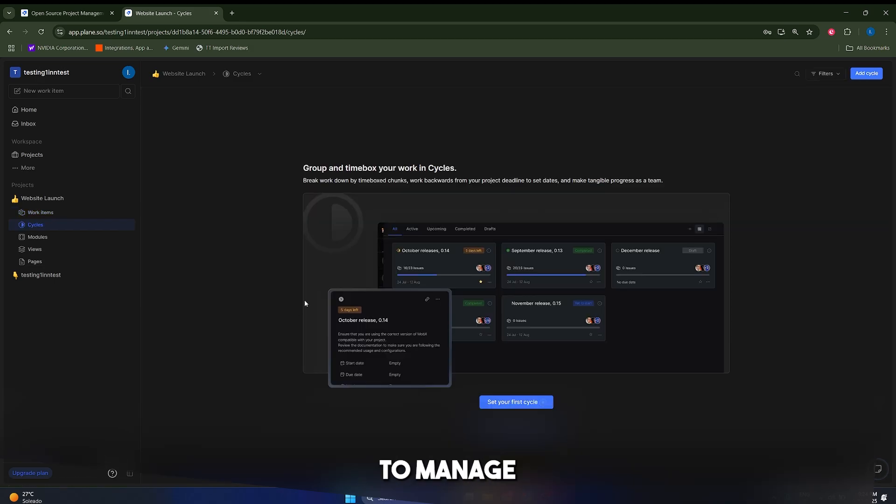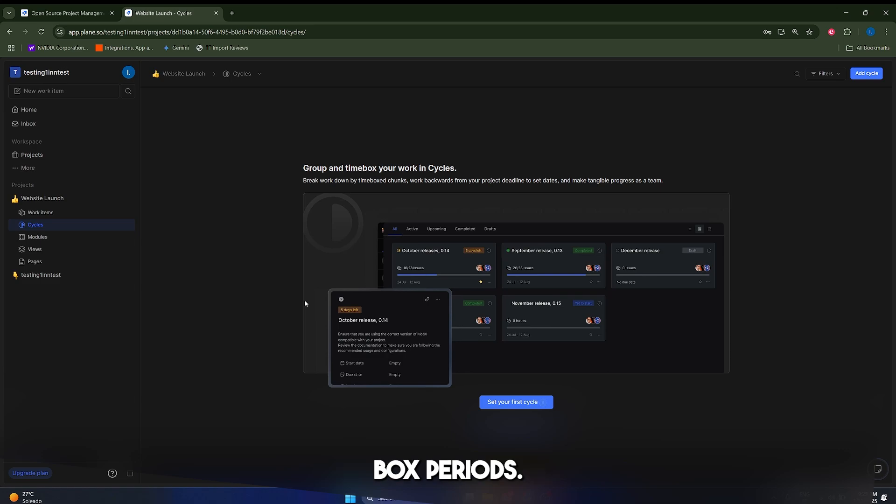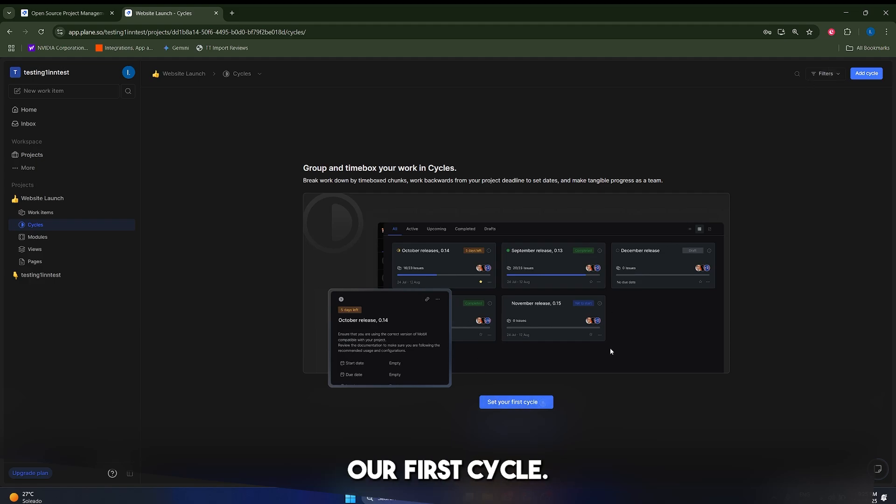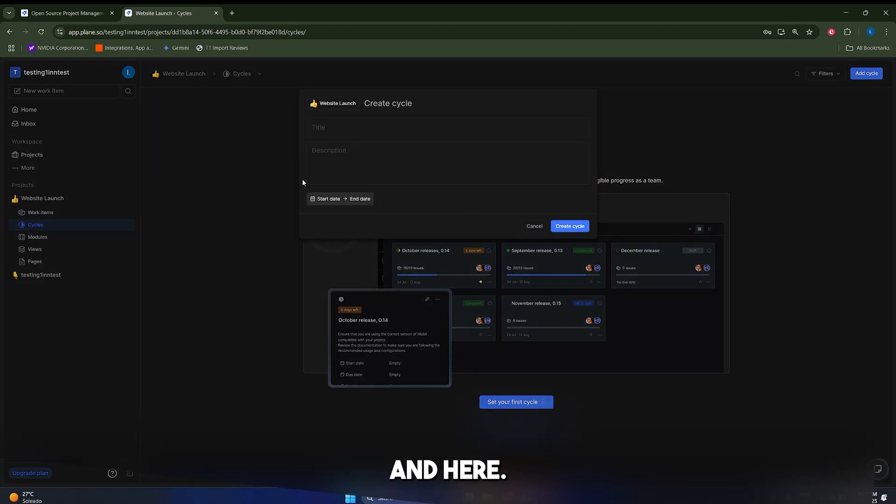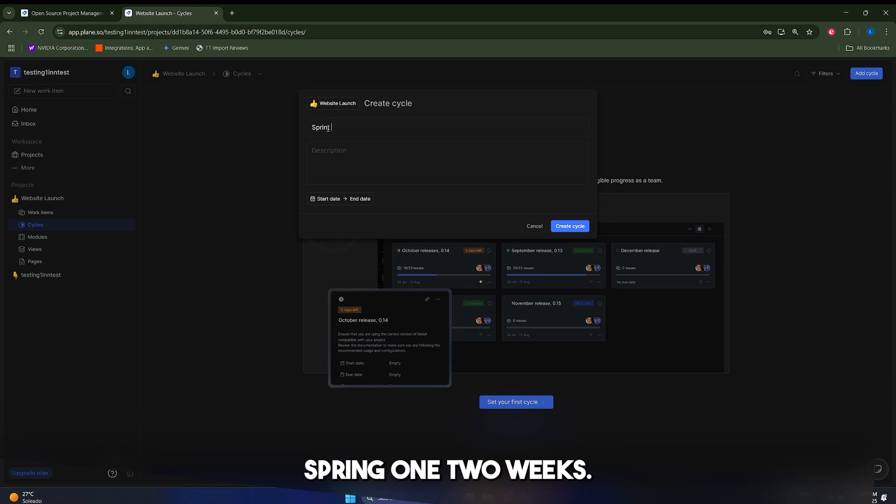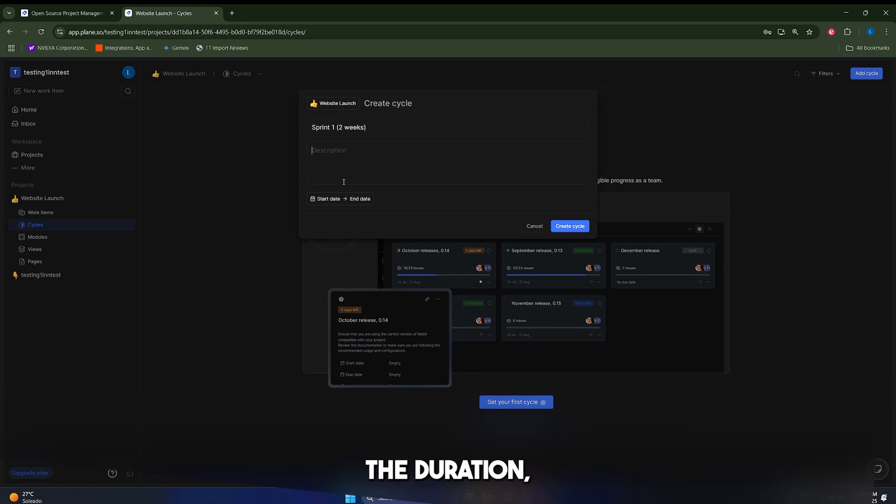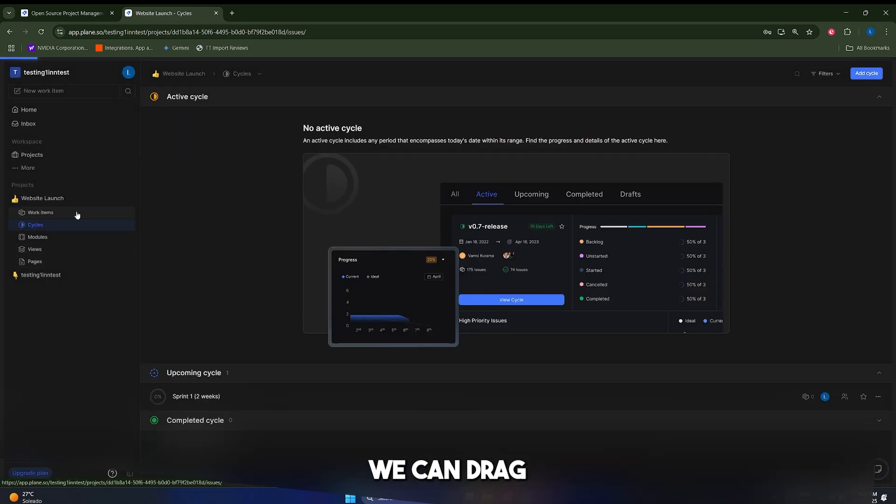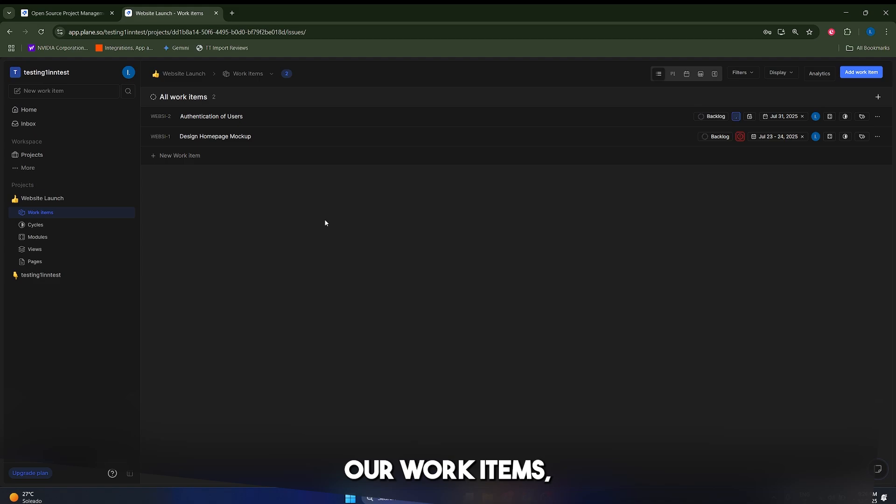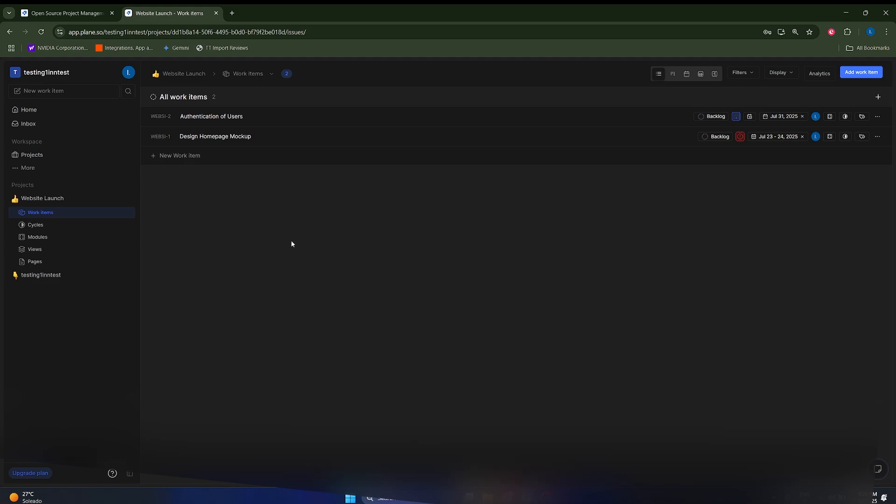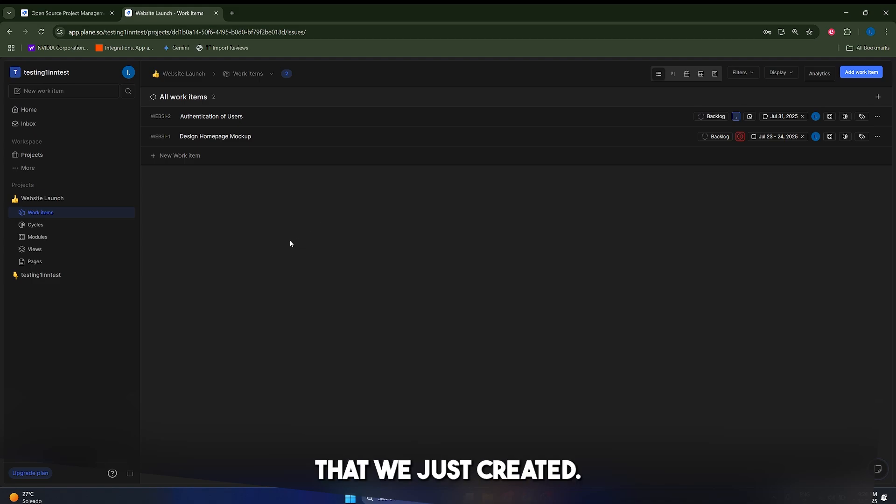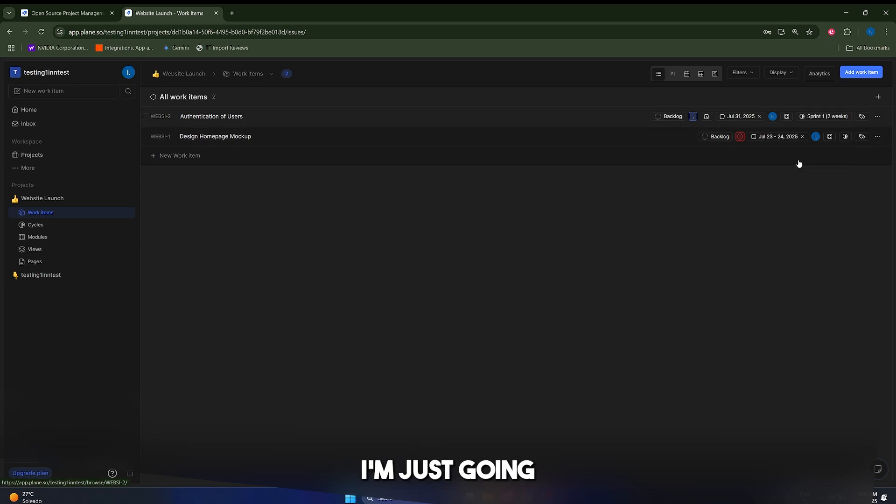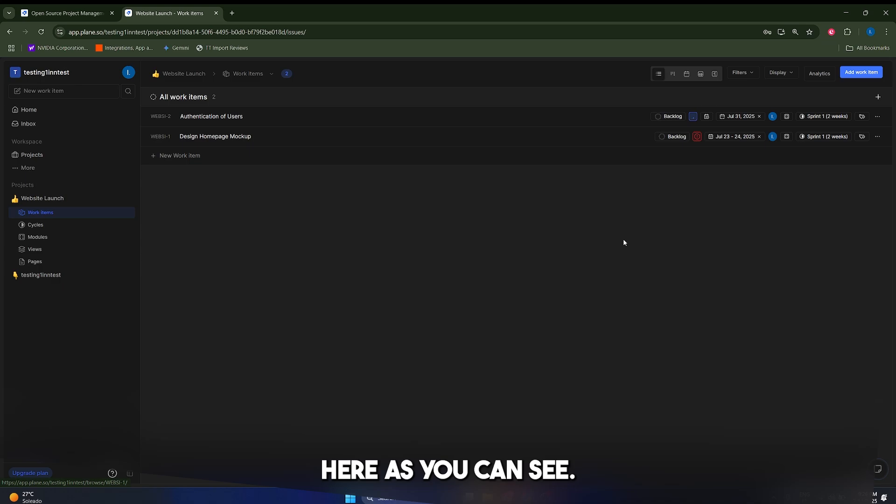Now, also, guys, to manage our work in time box periods, Plane uses cycles, which are essentially sprints. Let's first create our first cycle in here, and we're just going to call this sprint one, two weeks. This is going to be the duration, and we're just going to create it like this, guys. It's going to be very simple, and what we can do now is we can drag our work items, our tasks, our issues to this particular cycle that we just created. So let's click in here. I'm just going to click on this button, and then I'm just going to assign it to here, as you can see.